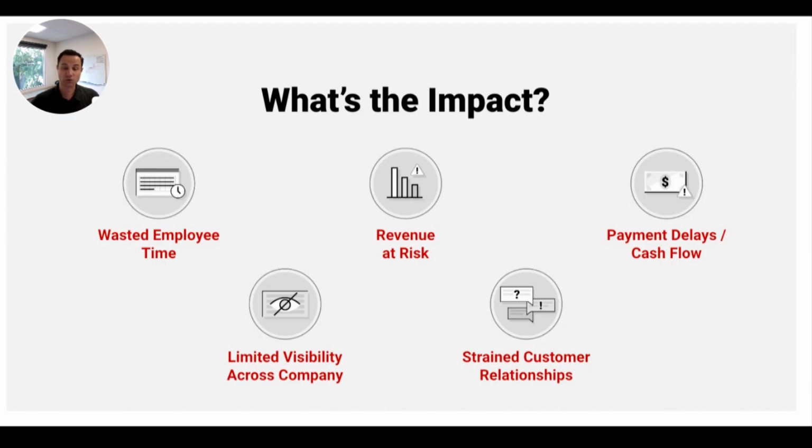So again, the one thing that you're truly in control of is your own processing speed of, once the work is performed, getting that document to your general contractor. If it's an estimated change order request, it's the same concept. The first one to submit their change order request is the first one to get it approved. So we help give you guys a tool set to do that.